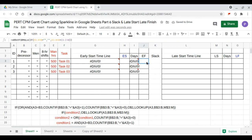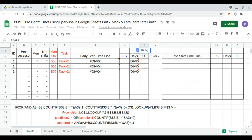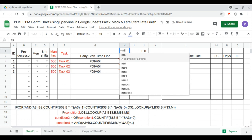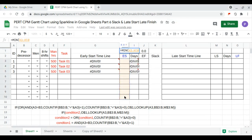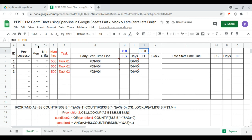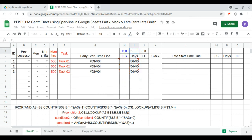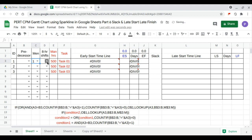Next is the project end date, which is the maximum of the finish day range. The project start date is the minimum of the start day range. The total duration is the maximum minus the minimum. Our default is one man per shift and one shift per day, and we drag this downwards as the default.